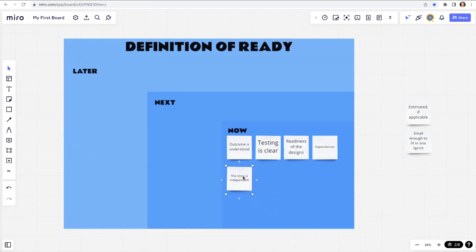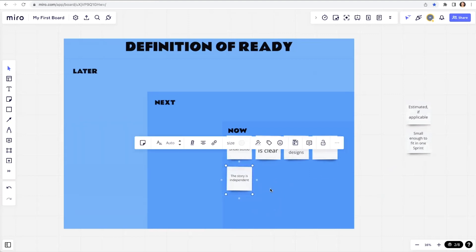Number 5: The story is independent. That's also somewhat utopian for some teams. Sometimes reality is that the team has a story for backend and a story for frontend. If they are mocking API calls and want to do some frontend work in parallel with backend, that can work. What would be good is to at least create an epic and link the stories, so everybody knows what group of stories need to get released together. Ideally, we have a story that describes a given use case.